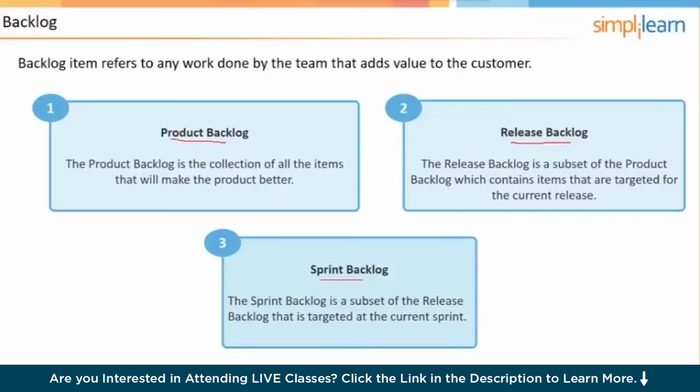For example, I've got a real life project that I'm working on, and my product roadmap has 3 versions. It's a website. The first version is free. The second version includes a membership component, and the third version includes a referral commission portion to it. And so I will then do 3 releases. I'll have all the user stories that will result in version 1, all the user stories that result in version 2. So that's what the release backlog is.